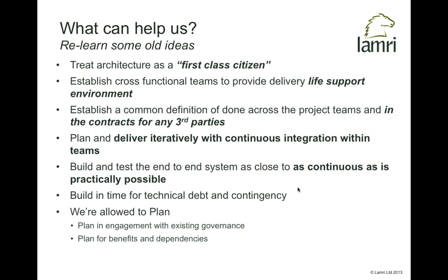One thing we can do is treat architecture as a first-class citizen rather than something that just evolves. We can use architecture — an idea of the system structure that will evolve — to help direct and organize development teams. We might need a delivery life-support environment for allocating features onto teams, with some method rather than letting teams pick features at random. A cross-functional program team can allocate features and also listen to improvements coming up from individual teams.